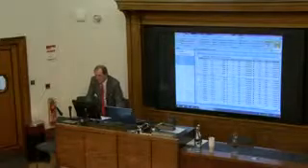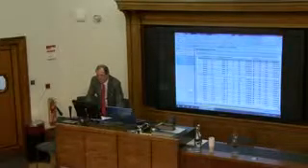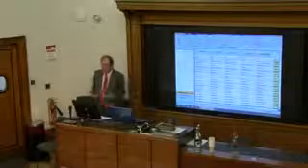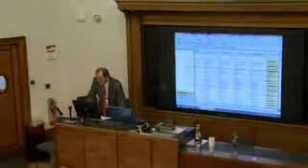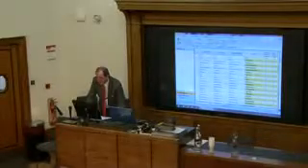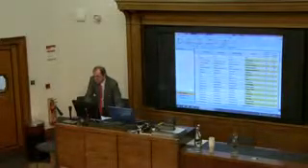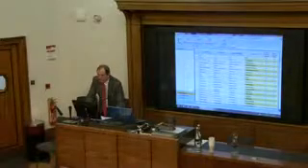I can select any field I like. So if I select More, I can then select any field that's been imported to do my analysis. And I want to look at baseline duration. I want to see if anyone's been fiddling their plan and changing the baseline without me knowing.